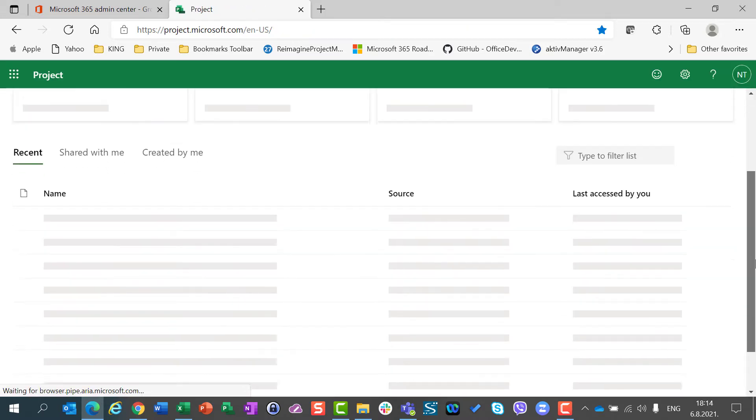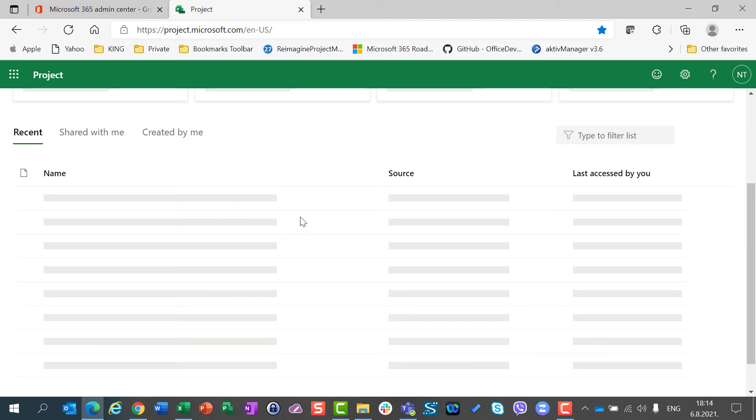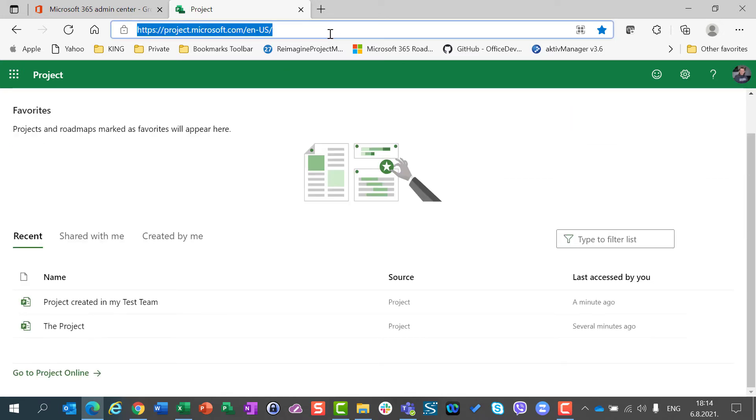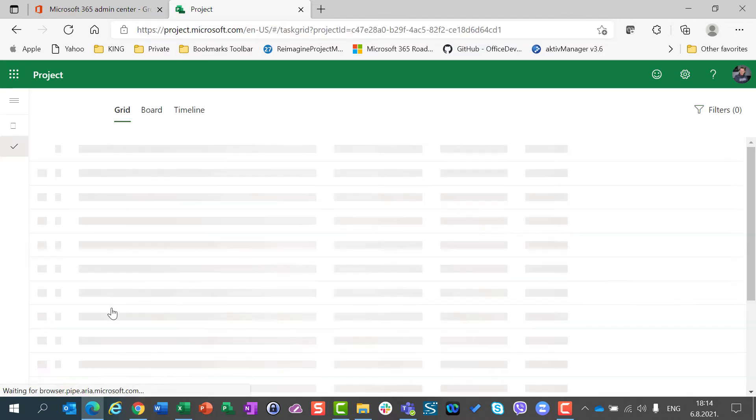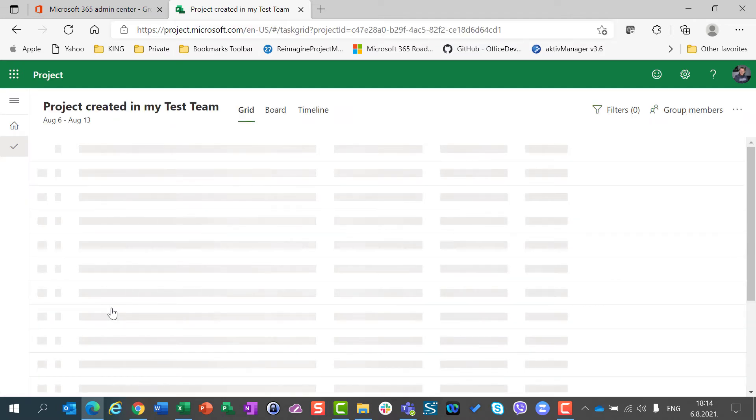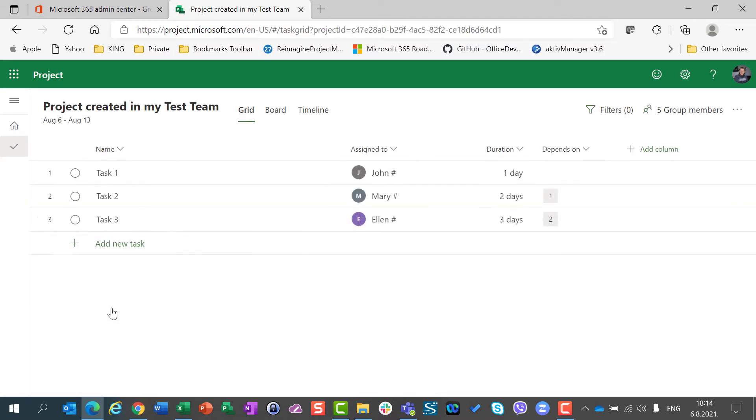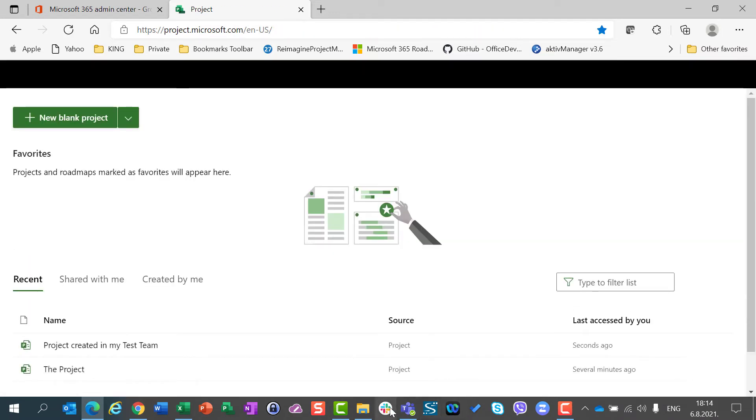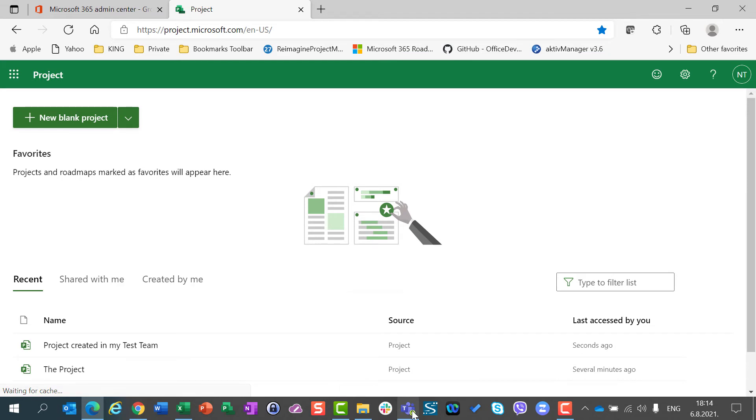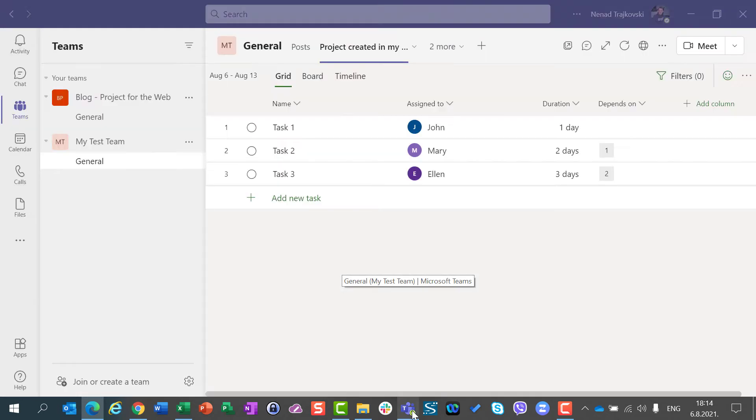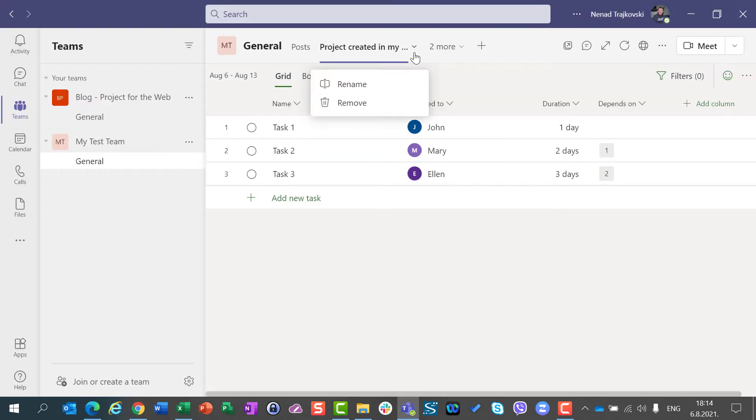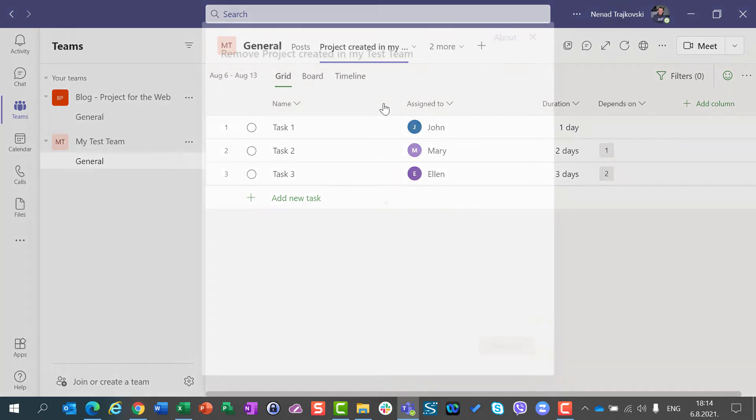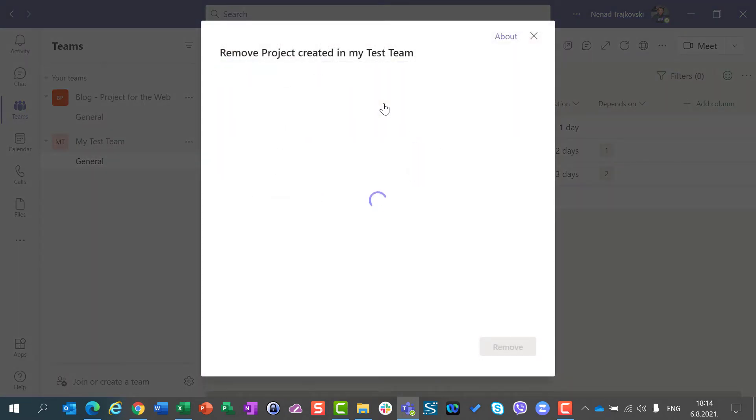First what I am going to do, I am going to see project created in my test team. First what I am going to do in Microsoft Teams, I am going to remove the project. So I go now to Teams, and I can say remove. If I remove project, it will only remove the tab from Teams.